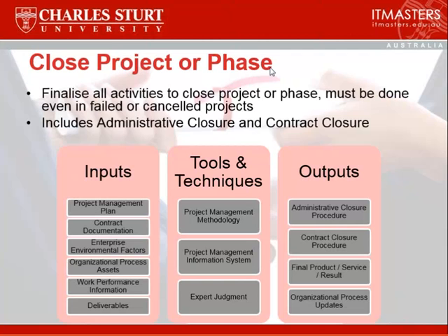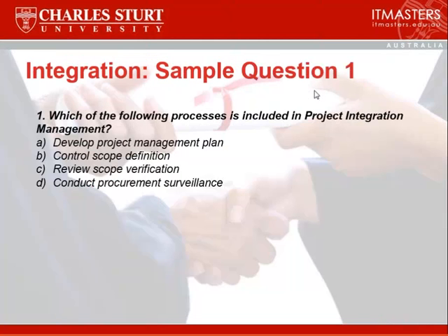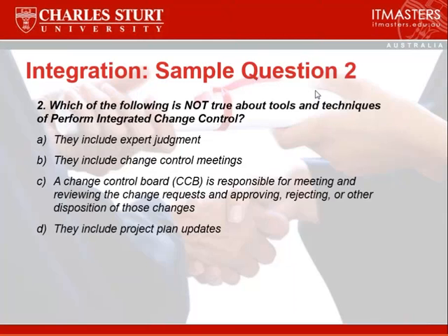Close your project and phase. When you get to the end of the project or the end of the phase, you need to finalize a whole lot of things. You need to release people who are working on the project. You need to archive all your materials. You need to make sure you get the sign off for everything else. And these are all the inputs, tools and techniques, and outputs. The questions, again, I'm going to leave to you.